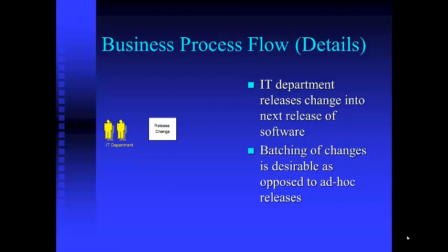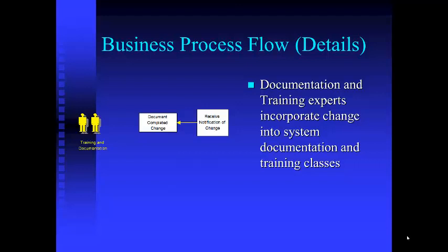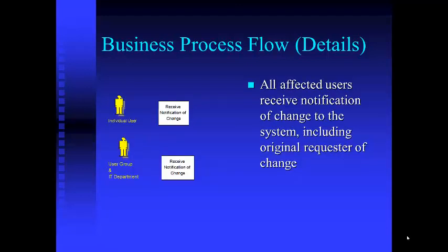Batching of changes — putting them all together into a larger group and releasing perhaps once a week or twice a month — is more desirable than ad hoc releases because it keeps the system stable. The documentation and training experts incorporate the change into system documentation and training classes. Then all affected users receive notification of the change, including the original requester. It's important to close the loop on things.